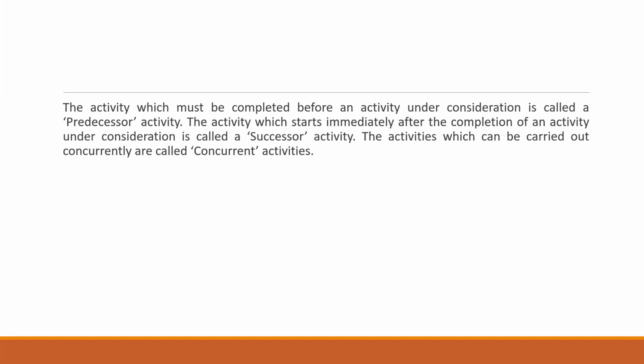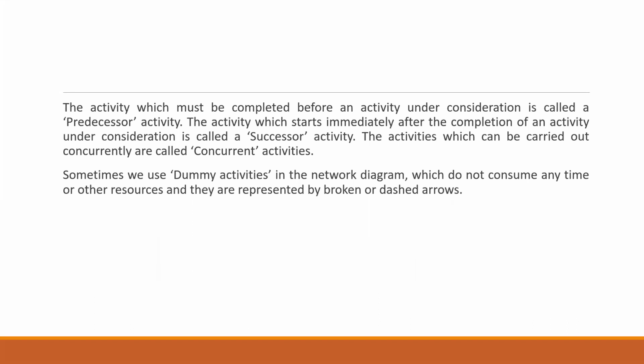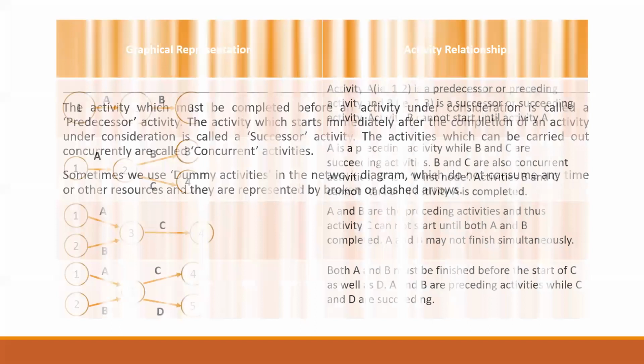We will see that after a few slides. While representing the dummy activity, the arc is presented as a dashed arrow. You can put dotted lines and put the arrow at the end, not a solid arrow. I'll show you an example of that.